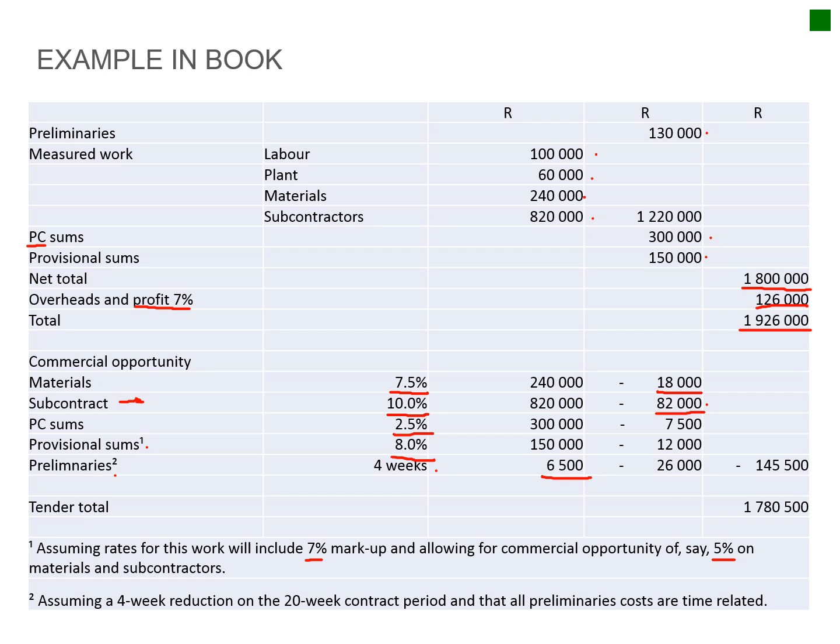And this is where contractors usually make the best or the highest amount of profit, is to actually get off-site as quickly as possible. So please remember that. So this is where you actually can have the biggest competitive edge on other contractors. So all these possible savings are added and you subtract that from your contract amount. So effectively you